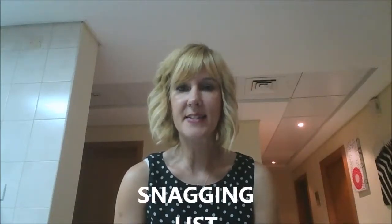So these tend to be things like a scratch on a work surface, or maybe some cupboard doors in the kitchen need to be adjusted, or perhaps the patio door lock isn't engaging fully. So all of a minor nature. What you do is record all of these items before you take ownership of the property, whether you're moving in or whether it's a property that you're managing on behalf of somebody else. You'd make a record of them, and this is called your snagging list. So basically it's a list of minor faults or problems that are found with the new build property.